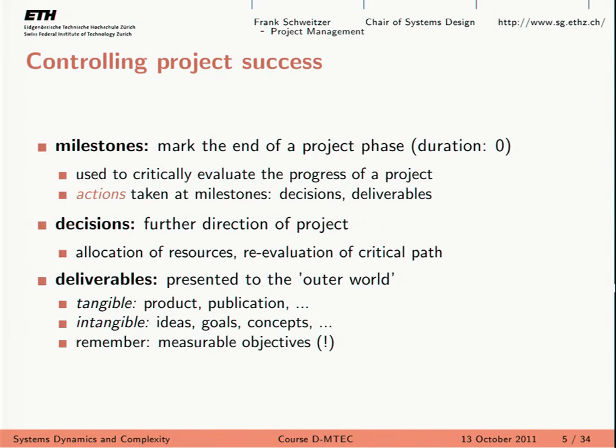But the point of this slide is that we can have feedback loops between phases and within a phase. All right. So how do we control for success in terms of quality, in terms of time, between different phases, and also within a phase? And probably the MAS students, or also the master students with work experience, you already know that people like to use this idea of milestones, right? You can have milestones or checkpoints, as many as you want, basically. Of course, there is again a fine balance between having too many milestones, too much paperwork, too much administrative overhead, and too few milestones, which would basically leave a lot of deficiencies unspotted on time.